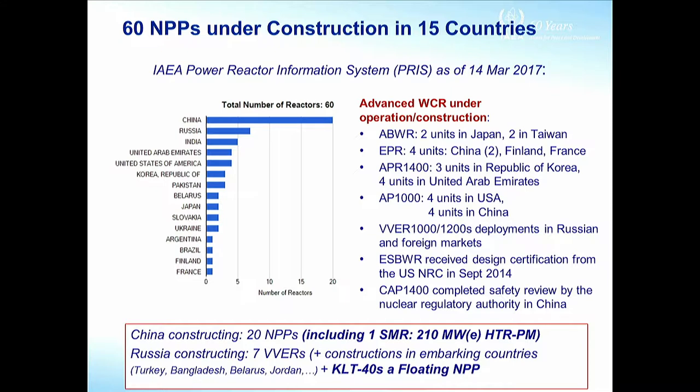the EPC is Areva, without EDF. Historically, the nuclear power plants in France had EDF as the architect engineer, not Areva. Plus, it was the first time that they were interacting with the non-French nuclear regulators. So this very well-known delay and extra cost comes from very specific reasons which have been analyzed recently. For people who may be interested, the IEA is in the process of performing a comprehensive study on the lessons learned from the construction of the first of a kind of evolutionary reactor, both the successful cases and the less successful cases. For instance, the VVR in Russia was built on time and on budget.